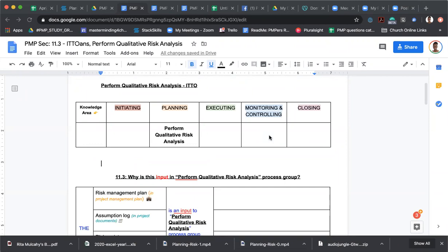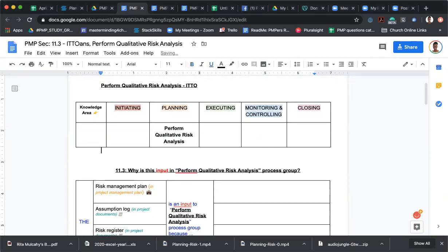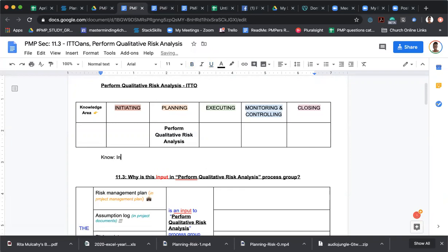So when we look at perform qualitative risk analysis, the key here is about prioritizing individual projects, and then absolutely to take action on them, and how key efforts are on the high priority list. So it's individual project, individual risks and basically it's the kind of impact and probability. Those are two key words that you have to associate with qualitative risk analysis.